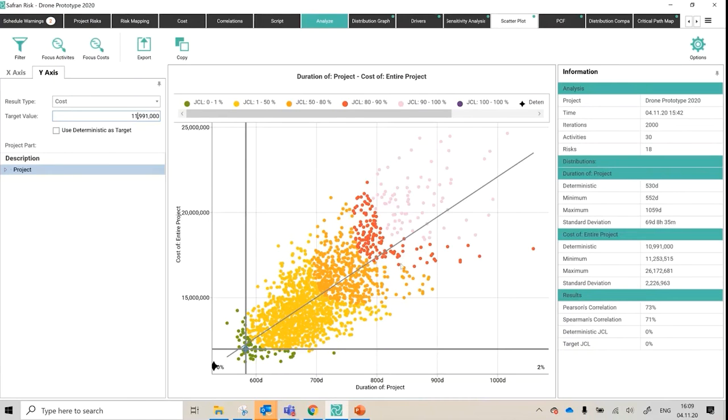And you can see that roughly creates a C or a curve shape, which means that if I hover over any plot, I can see which iteration it came from, what the X coordinate time was, the Y coordinate cost, and what the joint confidence level of pitching that as the contingency was: P83. Okay, that's maybe a little too high, but it's roughly the ballpark of P80. So I can go all the way over here and be approximately P80, and similarly I can go up this end of the curve and also be about P80. So this one's P81. I could maybe drop it there, P78.